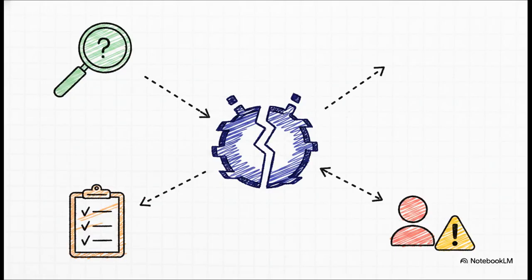And part of getting that regulatory authorization is dealing with defects. Because, let's be real, you will inevitably ship with defects. The regulatory expectation isn't zero defects. That's literally impossible for complex software. The actual expectation is that every single anomaly is assessed, every known defect has to be plainly described, individually risk assessed and dispositioned with a firm decision, like, hey, we fix this now, or we'll accept it with this specific rationale. And crucially, it must be disclosed to users if it's relevant to their safety.